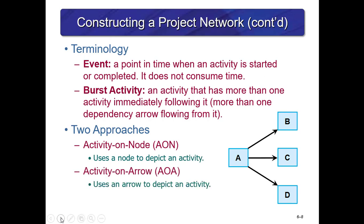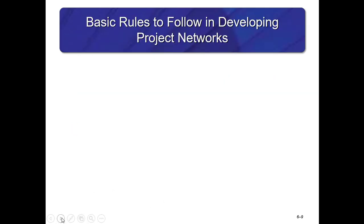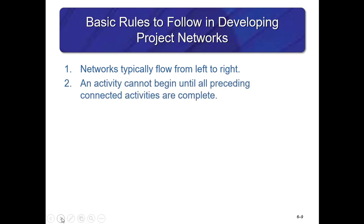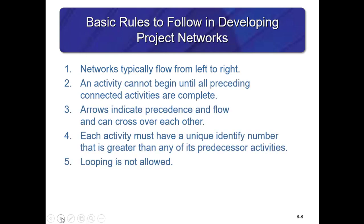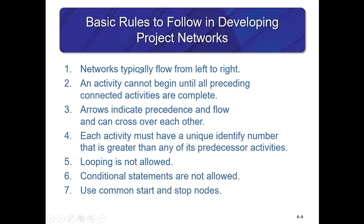Two approaches to creating network diagrams are activity on node and activity on arrow. In this textbook, we focus on activity on node, which uses a node to depict an activity versus using an arrow. Basic rules for developing project networks: networks flow from left to right; an activity cannot begin until all of its preceding connecting activities are complete; arrows indicate precedence and can cross each other; each activity must have a unique identifying number greater than any of its predecessors; looping is not allowed; conditional statements are not allowed; and use common start and stop nodes.